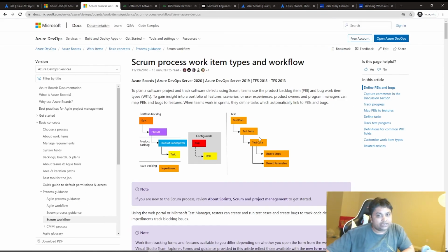But before that, if you have a project and you are working, how can we break down bigger features? You cannot take all the features in one sprint or two weeks. So if you think of this screen, all the bigger goal, or what we are going to build, is called a kind of epic, that is, what software we are going to build. Then it is broken down into features, what features it will contain. Then a feature will be broken down into user stories, and a user story will be assigned to someone. Then tasks will be created by us, saying this is the task we are going to perform for this user story. Maybe we are going to write some backend code, or do some UI work. So that kind of task we will break down.